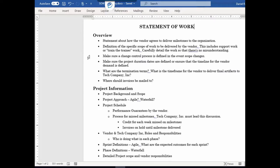One of the ways to ensure this is to work on the SOW with your project team and your executive stakeholders. Make sure especially the executive stakeholders are on board with this particular SOW. Or if you're working with a procurement group in your organization, make sure you stay to their standards regarding vendor contracts. Another thing: make sure the change control process is defined.